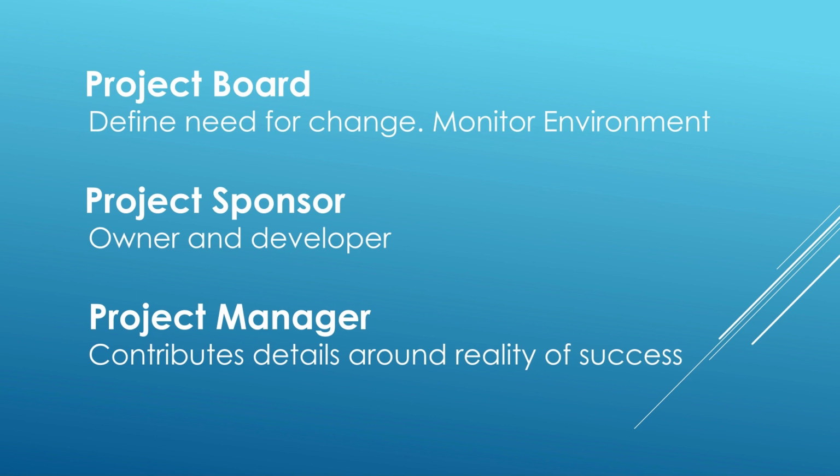Of course, the project sponsor is not an expert on everything. That's why we have project managers. So project managers will be able to get involved with the business case from a point of view of the reality of actually making this happen in the real world. They are the ones who have to turn this idea into tangible products and benefits at the end of the day, and they're going to have valuable insights where they can feed back into that process around a way to proceed, a potential expenditure, a potential time frame, and be able to use their expertise to fill out some of those details. Project managers are not always involved in that business case, which can cause its own problems. So the sooner we get the project manager and their expertise involved, the more likely we're going to end up with a rigorous business case that can be turned into reality.